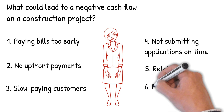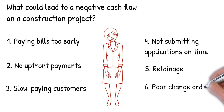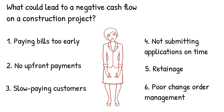Poor change management. If a client changes any aspect of the original scope of work, costs, or durations, it can severely impact the contractor's cash flow. Without proper management, which generally falls to the project's quantity surveyor, a company runs a very real risk of not getting paid everything it is owed. Similarly, the longer it takes to process a change order, the longer it takes to be paid, which can also negatively impact cash flow and the overall project's progress.